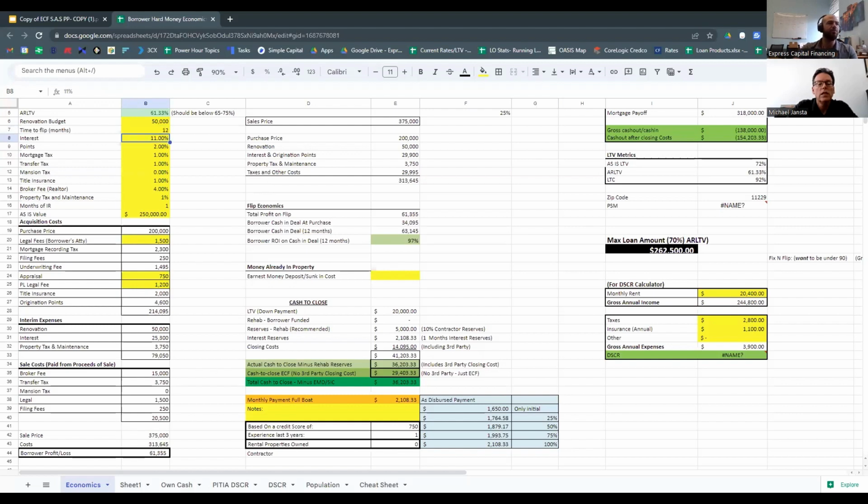Let's put it back. It's a great opportunity for sweat equity too, right? You might have some contractors doing some of the hard stuff like the plumbing and electrical, but you can be in there painting and doing some of the work yourself to expedite that rehab process. Yeah. And sometimes I'll pay more to a contractor. If I get two quotes and one of them tells me it's a shorter time frame than another, I would pay more money most of the time for that guy to do it faster, because overall he's actually going to save me money, because now I don't have a higher overhead to pay. So it's not just about the cheapest offer that you get. Sometimes the best offer is actually slightly more expensive.